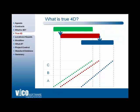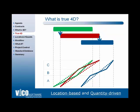So the truth is that factors vary from location to location so we'll end up with actually a varying pitch of this. The slope of the line will differ depending on the amount of work and the amount of resources that we're adding to these tasks. So when we add quantities by their location in this flowline, we can identify that progress is not actually linear and it doesn't take the same amount of time in each location. So task one, the green task, starts as a lower slope but perhaps that's due to there being less work in that location and it increases towards the end. So we start here with a lower slope and we increase towards the end. So it's not actually that we're flowing through locations in linear fashion.